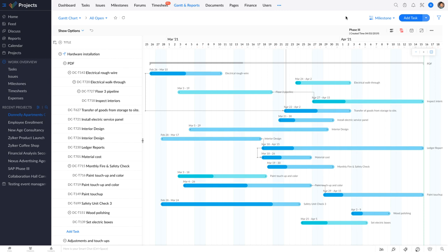It is the longest path in a chain of interdependent activities from start to finish in a project. You could enable the critical path from here. When you do so, it would highlight all the tasks that are close to the end date of the project and their dependent tasks in red. Now this would allow you to replan all your tasks and make sure that all your tasks are completed before the end date of the project.